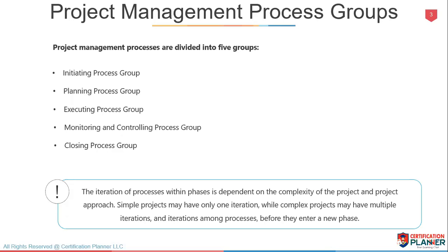Now, one thing to keep in mind is that we're teaching this course from the aspect of an extremely large project so that we can encompass everything into it. While all projects may not have all of the processes, all projects should go through all of the 5 groups, if you will. So they should go through an initiation, a planning, an execution. You should have monitoring and controlling, and then you should have a closeout.